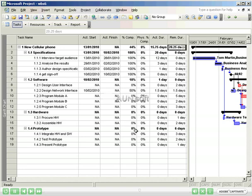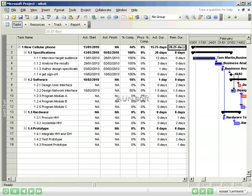I notice right away that I've spent 15.75 actual days on the project, and I have 20.25 days remaining. Combined, this equals 36 days. Compared to my original duration of 28 days, I know right away that I am 8 days over.